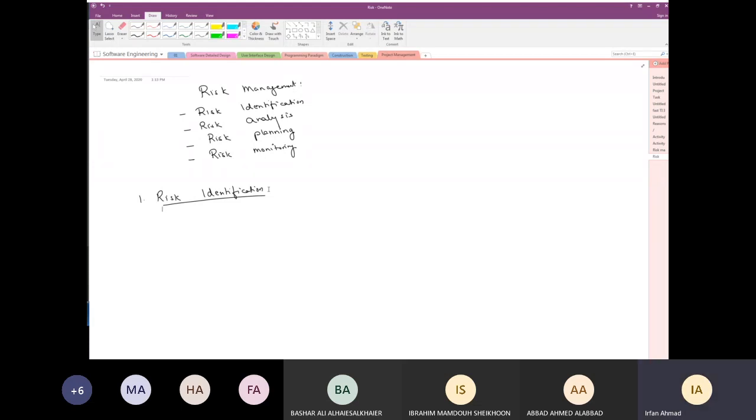What if a project needs some members of the team to get some training in a different country? So part of this project, you're going to send your team members to a different country to get some training, which is needed for the project development. What could be some of the risk? Let's assume they are going to go for 4 months for training. The possibility that the members will not acclimatize themselves with the new environment. They may not get comfortable with the new environment, and they are not able to take the benefit from the training. This could be one possible risk, right?